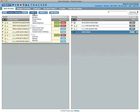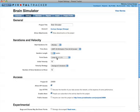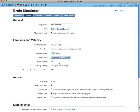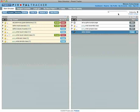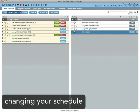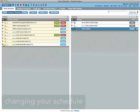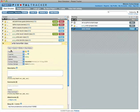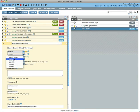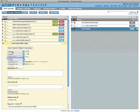To assign more than three points to some stories, change your points scale. If you start a story that's in the Backlog or Icebox, it will jump into the current iteration. If you decide to move it back, you will have to change its state back to Unstarted.